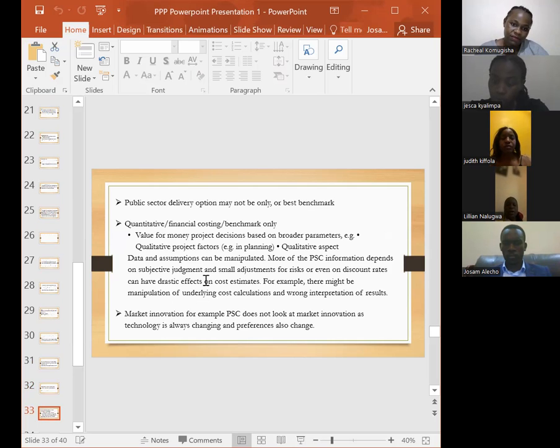Thank you, Rachel. My name is Lillian Nagwa, and I will present the other weaknesses that the PSC faces. The first one is inadequate evaluation of risk transfer. The costs are not always adjusted for some major risks in big projects. It involves omission of certain types of risks, as it ignores the fact that some risks involve huge potential effects on project costs with great losses incurred.